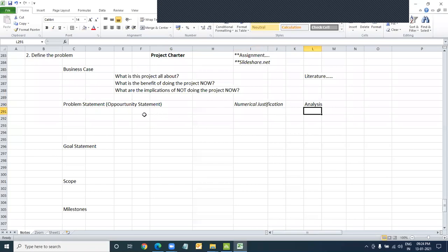Now, what it should contain, always keep this in mind, basic stuff. It should always contain the data period under study. You must have analyzed the last 3 months data, last 6 months data. You must mention what time period. What time period is very, very important, so tomorrow somebody wants to go and check it out, the person can do it. Please feel free to check and validate what I'm saying. Is it right or wrong? So data period study is a must.